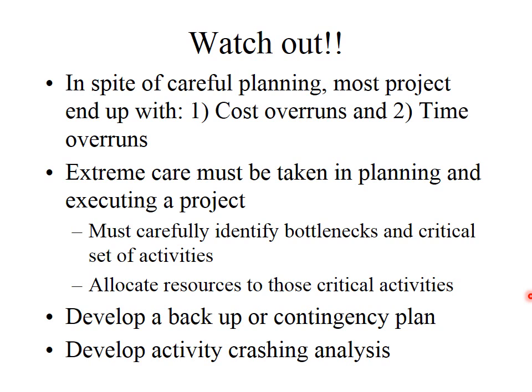And finally, there's crashing analysis. If you need to expedite the project, you need to figure out the best way to expedite, because crashing some activities takes more money than crashing others. Expediting some activities will be cheaper than others. So you have to develop a plan as to how you will go about expediting the project if need be.